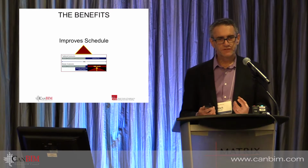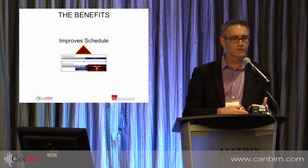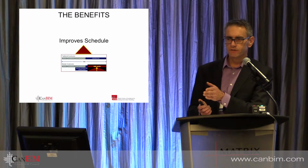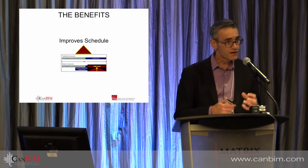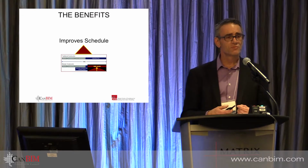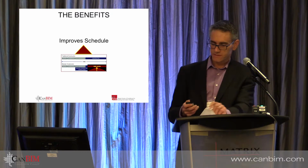When you start to build off-site, you can accelerate your schedule. You can be doing more work in parallel with each other, which means that now instead of delivering the first piece of raw material, you're delivering the finished product, which can be installed far quicker. That install time and the time that you need on site is critical. It also allows you to use your manpower far better rather than going in fits and starts and bursts of activity.